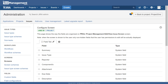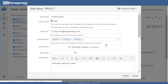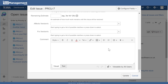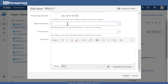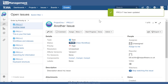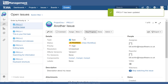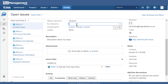After refreshing the page, editing the issue now shows affects version and fixed version at the bottom of the screen. Typically you'd raise a new issue and set the affects version — say, version one — because that's the product version where the issue was found. Later, as you work through the workflow and fix the issue, you'd set the fixed version — perhaps version two — to record which release the fix went into.